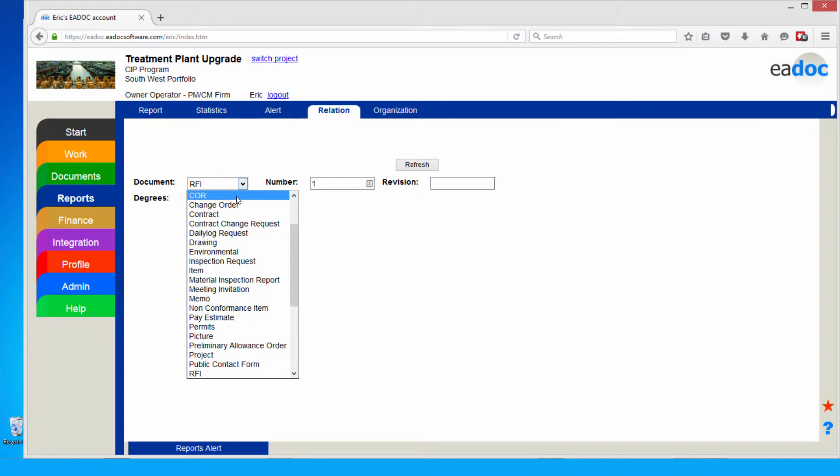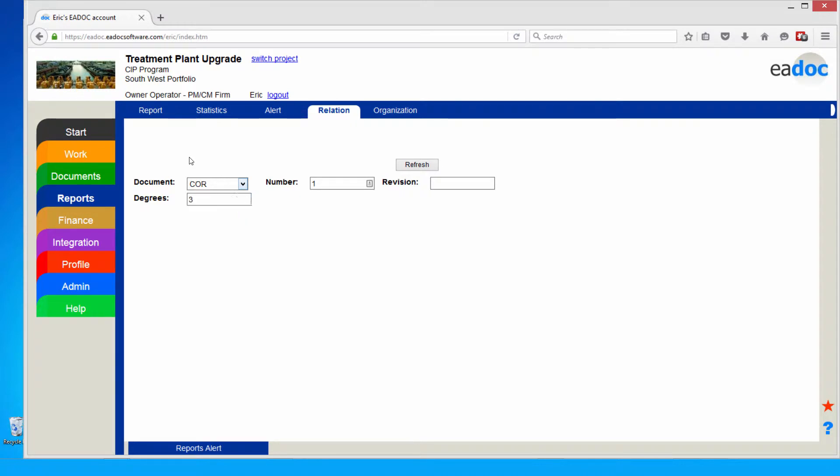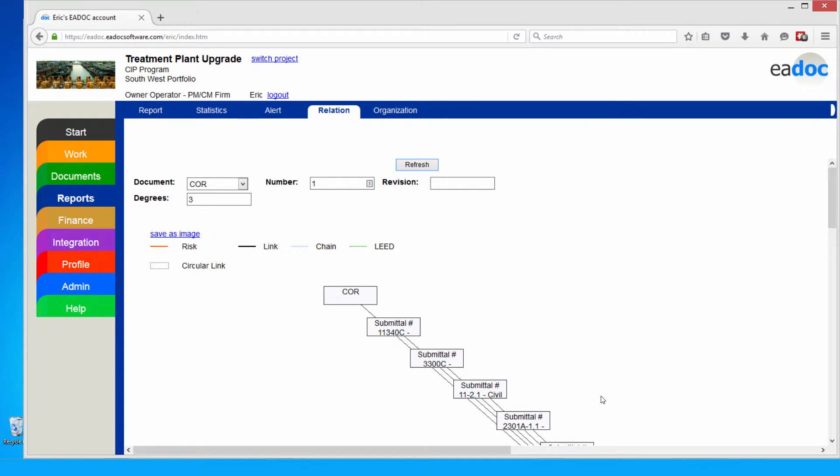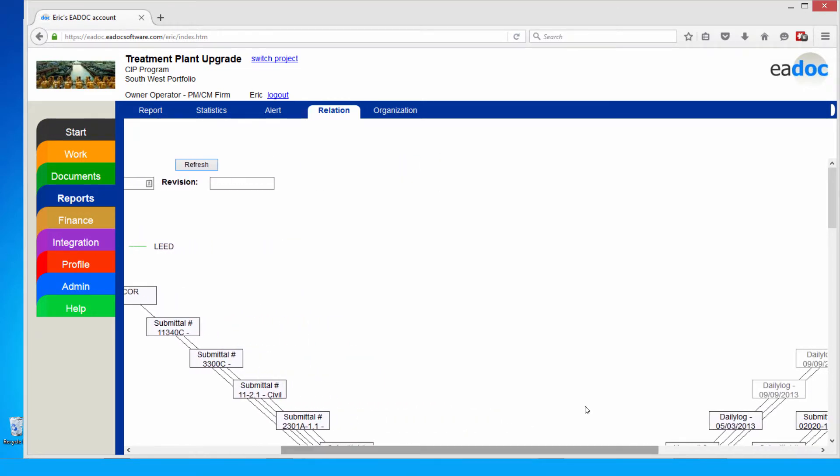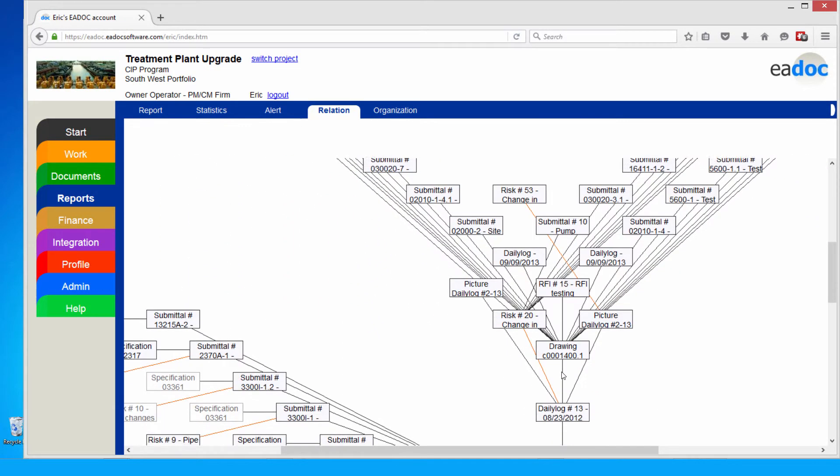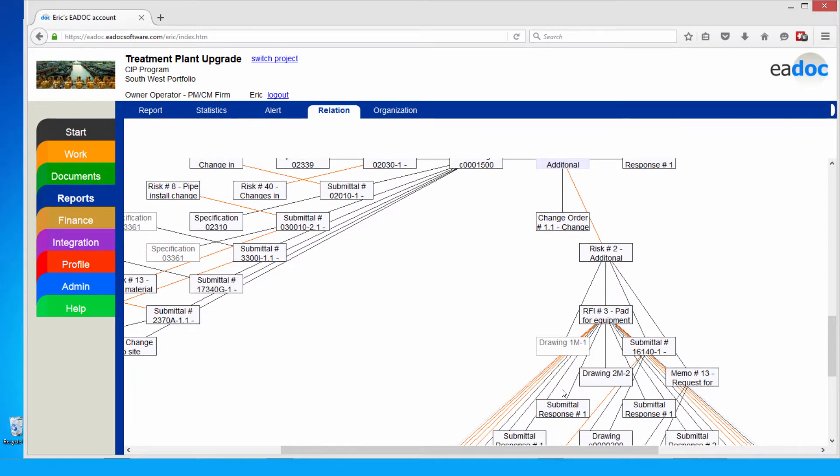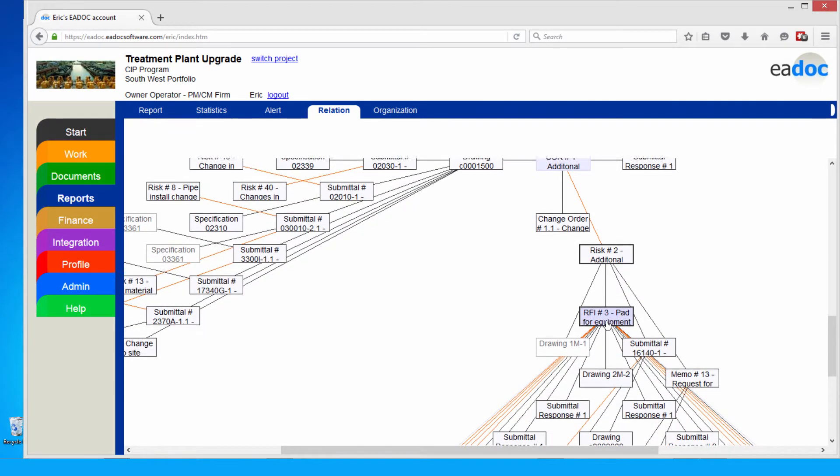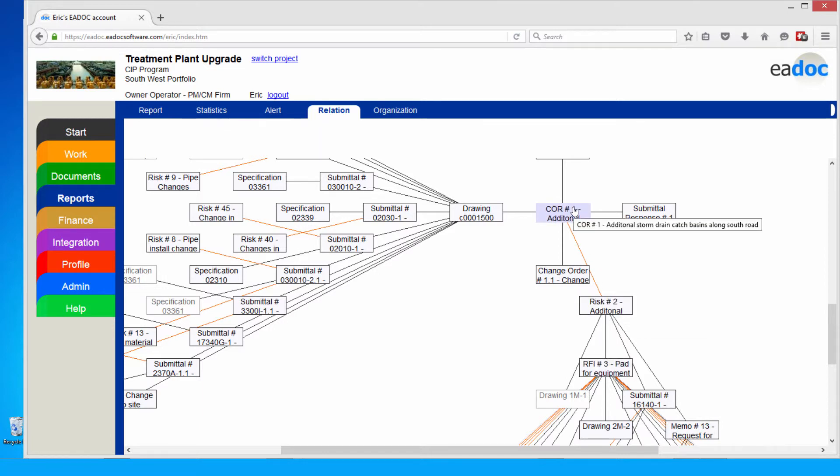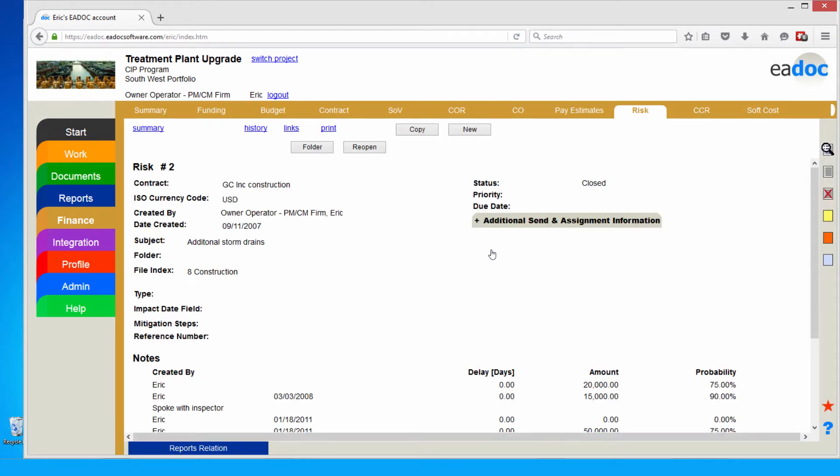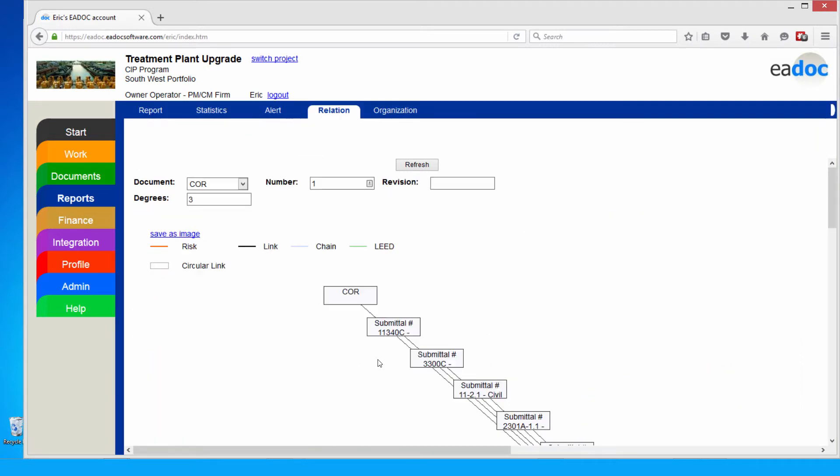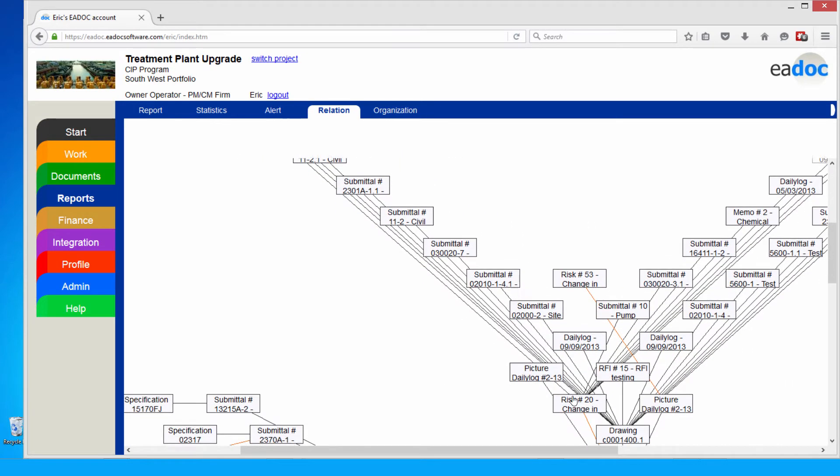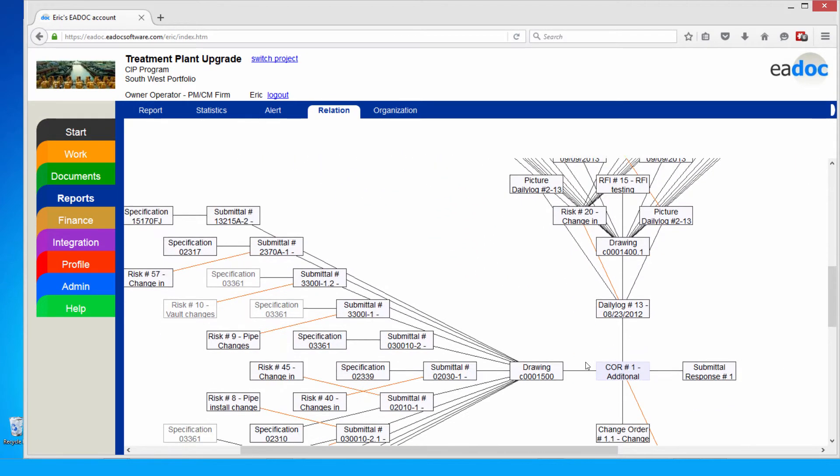One of the really powerful tools about EDOC and taking all those relationships is what we call our relationship reporting tool. What this does is it takes those links between the individual documents and communication and allows you to report on it. For example, I plugged in my change order request number one. It shows me the change order it's linked to, the risk item that's tied to, all the documents and communication. This is a huge benefit, not just for doing general research or learning about an issue, but if you get into a claim situation. When you've got to bring the legal counsel up to speed, I can very easily and quickly see all the documents and communication tied to this particular change on the project. Plus, it's interactive. I can drill down into the risk item and say, what was the issue that we were tracking that turned into this change on the project? It's a very powerful tool, not just managing all this information electronically, but the added value of reducing risk, helping you defend against claims here in the application for you.